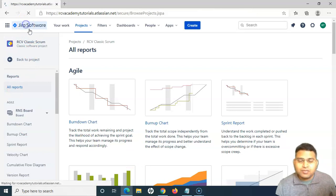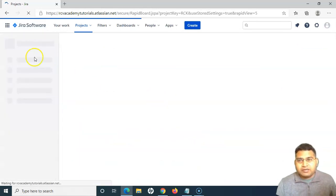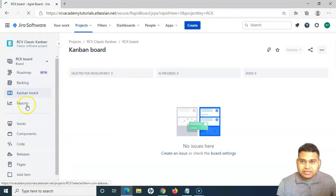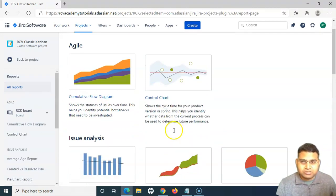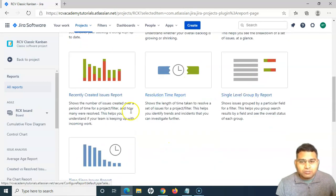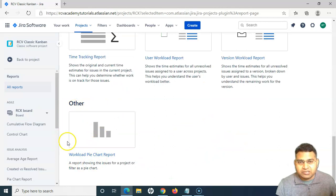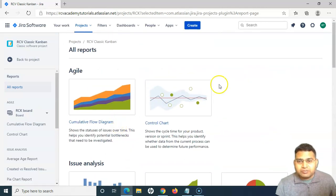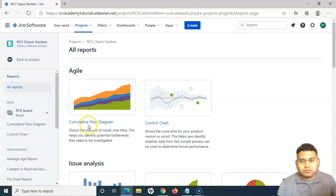Now let's go to the other projects and see what reports are available by default. If you go to the classic Kanban project, you'll have different reports available. In the report section of Kanban, you will see cumulative flow diagram and control chart — these are the two reports in the agile section. The issue analysis and forecast and management reports are also available, and are almost similar to what we saw in the Scrum project. The key difference is in the agile section, because Kanban is about continuous flow of work, so the cumulative flow diagram and control chart are more relevant to Kanban projects.